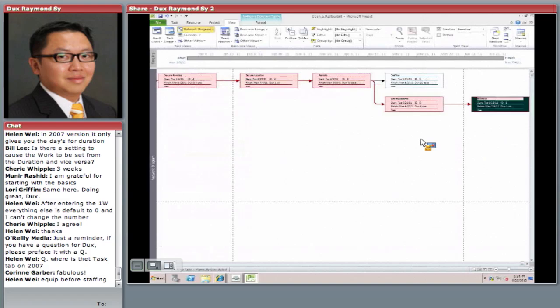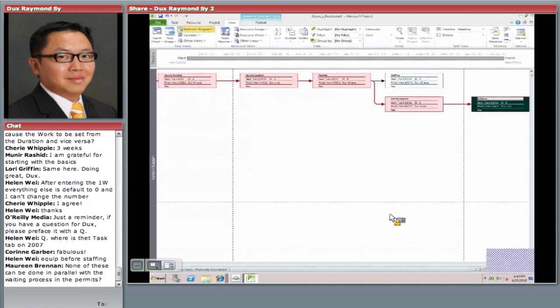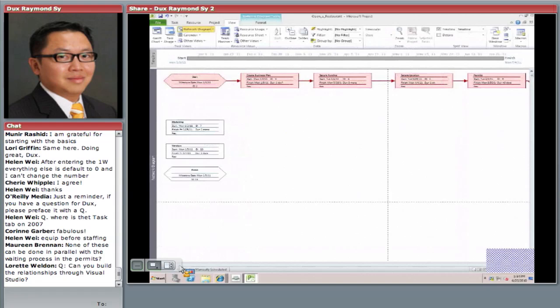Helen, let's see. Well, the staffing involves a lot of different things. There's ads, there's interviews, so I'm just doing that in parallel. But I agree with you. I mean, they can't start working until a lot of the things are in place. But I need my equipment in before I do the build out, or else Ty Pennington will be upset. There's nothing to work with there. Okay.